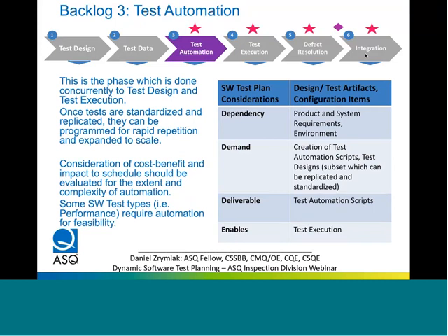So the first thing is, if you have a new build of the application and you have a regression test, or what's called a smoke test, to determine if this is suitable for further testing, that smoke test can be automated. It's performed very quickly, and you know within a few minutes whether or not the build is suitable for testing. If you don't do that smoke test, then you'll spend a lot more time executing, finding defects, and writing defect reports on something that's already flawed. So it's better to have something early on that pushes the test back to its developers.